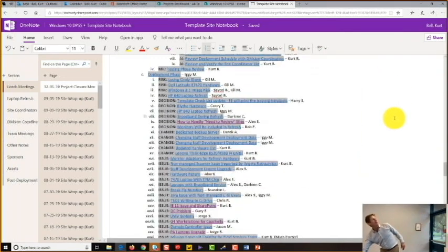There we go. Now, before the main deployment began, we encountered 4 separate risks right there, including one of them, unfortunately Cindy didn't make it today, was the threat of Cindy Glenn leaving. And we remediated that by, thank you Mike, and thank you Anita, we remediated that by having Harry Solis assigned, and unfortunately Harry's at a project right now, he couldn't join us. Harry was assigned to that. And then look at all the decisions we made, lots of changes and a lot of issues right on down the line.